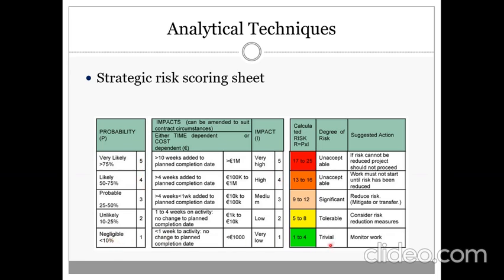The same for the minor severity that we have. This is between 1 up to less than 2 for the probability. The same for the impact, from 1 up to less than 2. So the multiplication will be at least 1 by 1, that's 1, and something less than 2 times something less than 2, that's something less than 4. So the maximum here is less than 4. This is the minimum, or actually the least severity of risks that we have for this table. So by the end, we have this, for example.